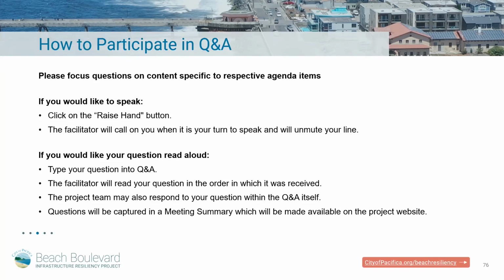Okay, and that I guess that's my question, because are we actually being realistic in that time frame for the amount of review that the Coastal Commission is going to have? I don't know, that slide didn't really point that out. No, that's a fair point. So I would say that for a project of this type, a year and a half to 2 years is probably the right amount of time to get through the permitting process.